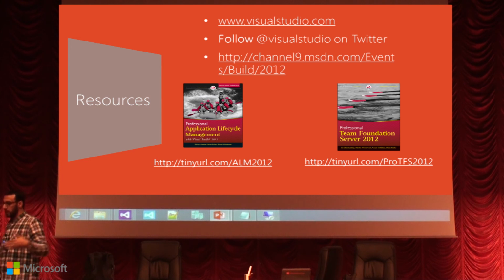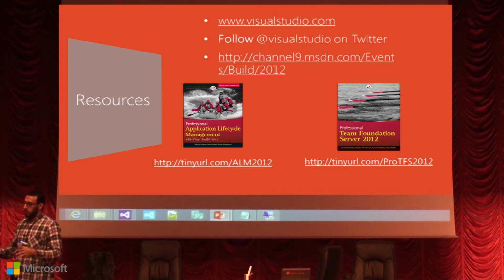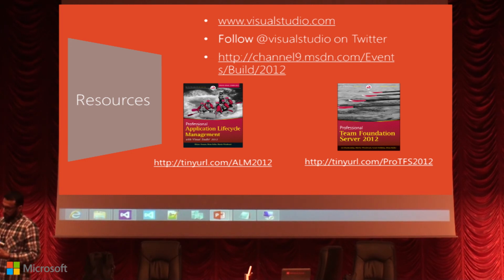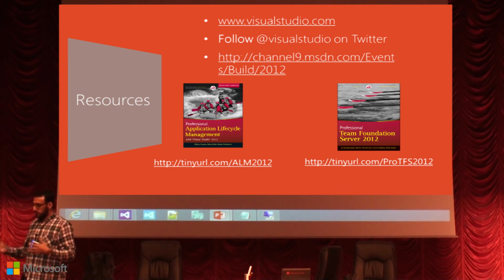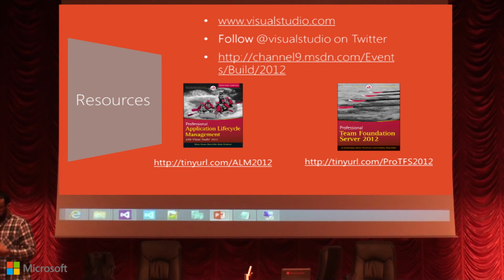As we said in the beginning, because all these capabilities are built into TFS, you can do tracing across all of this. Starting from a requirement, the requirement will be reflected into tasks. The tasks will be assigned to people, and at the end the developer will do a check-in. While you are checking in, you can say, okay, this change set is the implementation of task number 33. And even after that, if you have a bug, the QA engineer can say this is a bug related to requirement number 22. So you can have all the tracing across all the different phases. Okay.